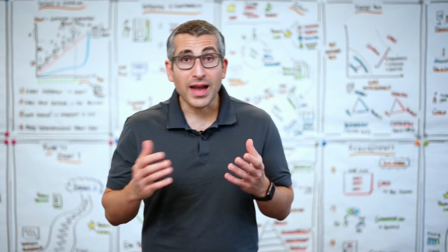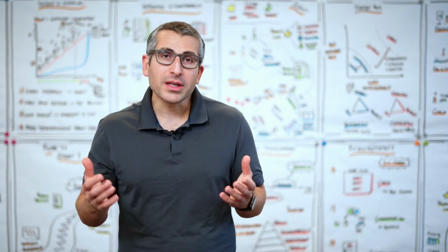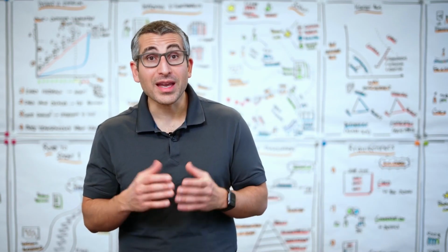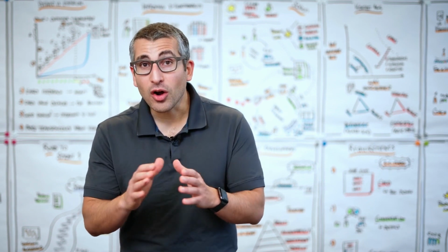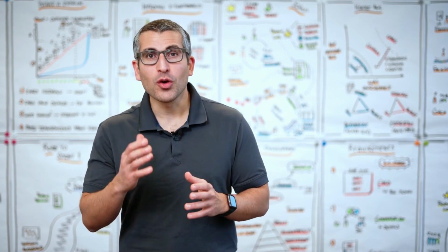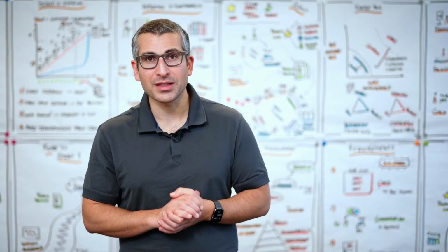The requirements that end up at the top should be very small and very granular, because a team should select them or should be able to select them into their next sprint. The items at the bottom can be still very vague. They can be cloudy. We don't need to have that level of detail, so we can also save the time which it takes to create that level of detail.